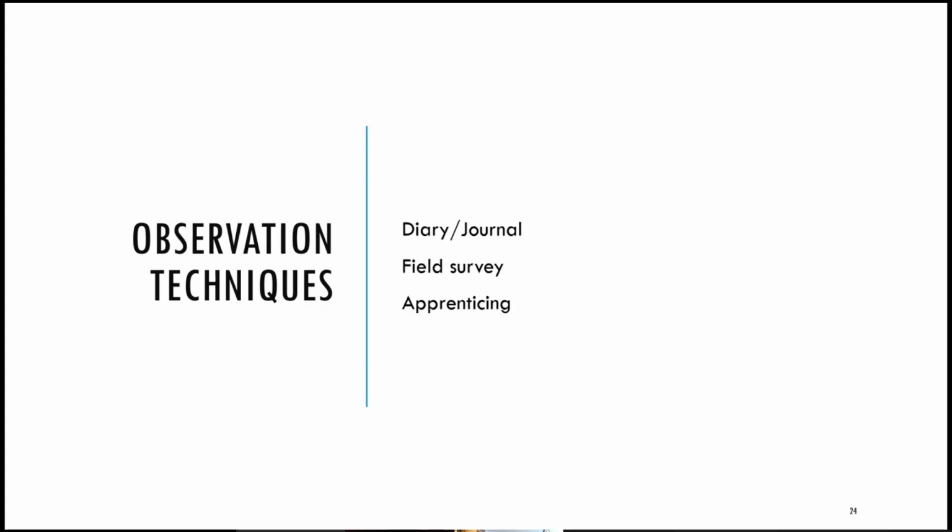It can also be helpful not only to talk with the stakeholders, but to work with the users, observe them. And there are different ways to do this. First, the diary or journal. The users try to document what they are doing in their everyday work. As an example, I try to identify which data they request often and how often. If it's not important to get a concrete answer, but just a guess, you can let them answer. But if it's important for the project, let them document it.